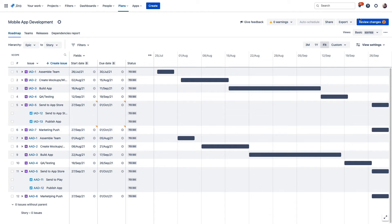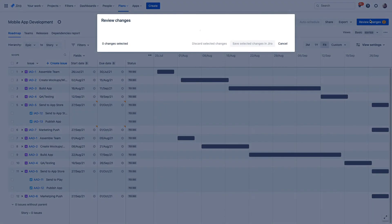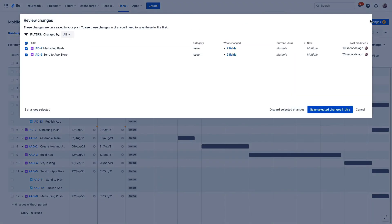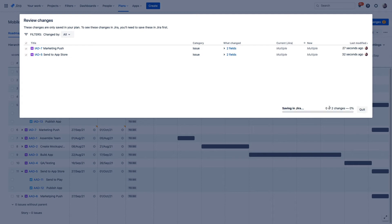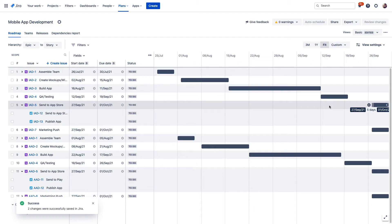And when you make a change to a plan, this button up here will activate where you can review all the changes that you've made before any of these changes impact the projects themselves. You can collaborate with the project leads on these changes before pushing them live or uncover additional issues during your reprioritization that you can address before they impact anyone.